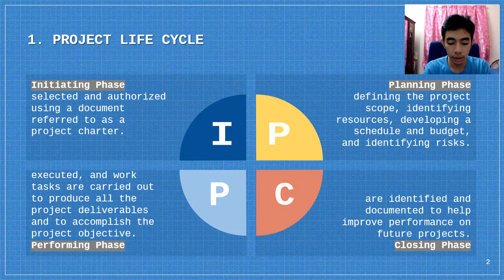Several alternative actions may be evaluated to determine the best approach to bring the project back within the scope, schedule, and budget constraints of the project. Determine if any sacrifice to scope, budget, schedule, or quality is necessary to accomplish the project. The cost of change varies with the timing in the project. Generally, the later in the project the changes are identified, the greater their effects on accomplishing the project objective.